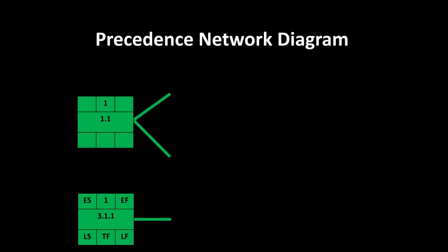Now that might mean 1 day, 1 week, or 1 hour. You need to ensure when you're doing this that you're using the same time scale for every one of your work packages. Do not mix, this will take 3 hours, that will take 2 days. Do not mix them, because it will get really confusing and your network diagram will not work. Most common one to use is days.